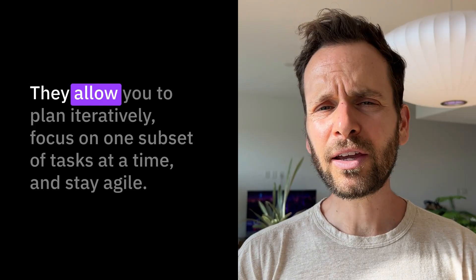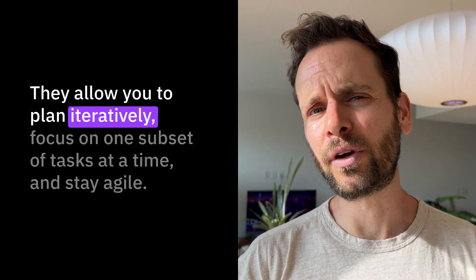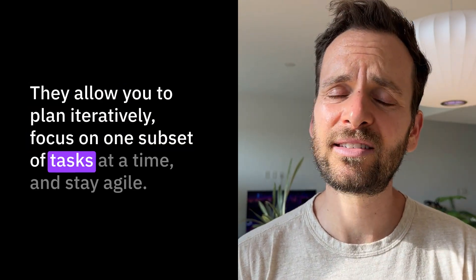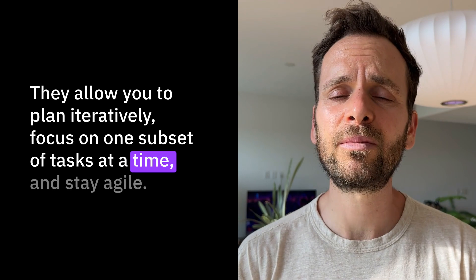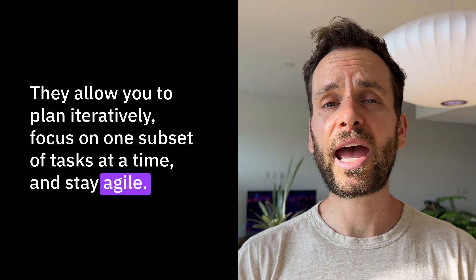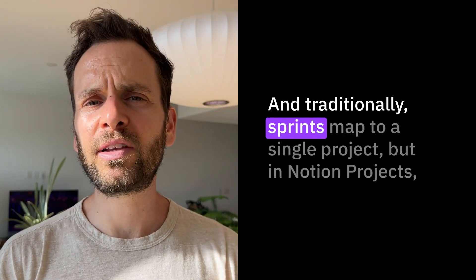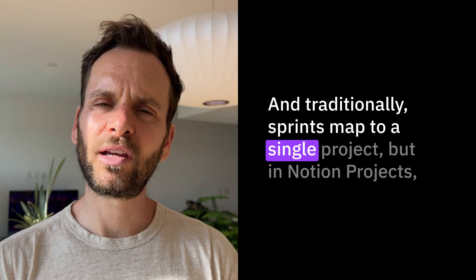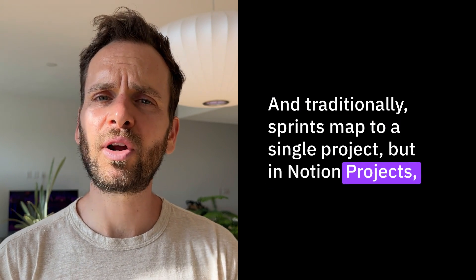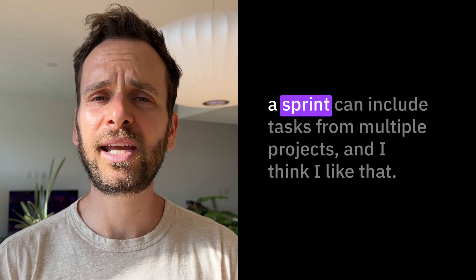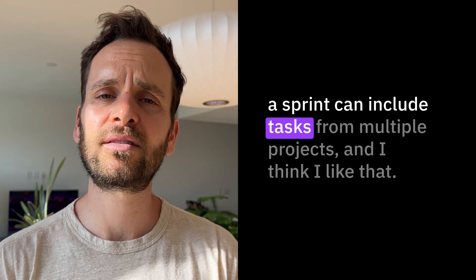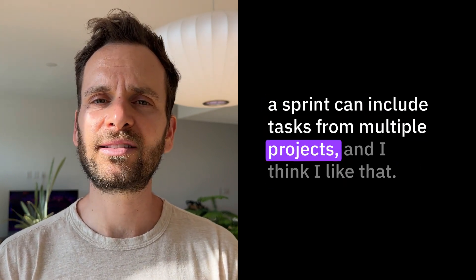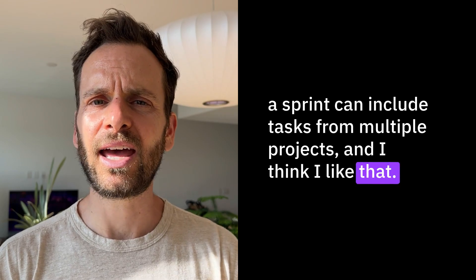As I mentioned, sprints come from the agile project management methodology. They allow you to plan iteratively, focus on one subset of tasks at a time, and stay agile. Traditionally, sprints map to a single project, but in Notion Projects, a sprint can include tasks from multiple projects, and I think I like that.